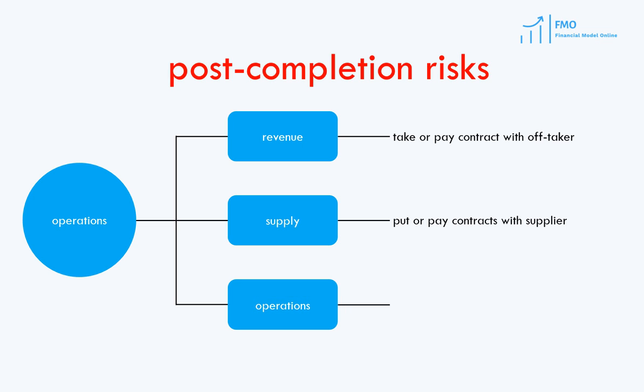And finally, it is operations risk. The O&M contractor responsible for the performance and maintenance of the facility receives variable and fixed payments for its services, as agreed in the O&M contract. However, if the performance of the project is worse than that specified in the contract, penalties will be applied to the O&M contractor.